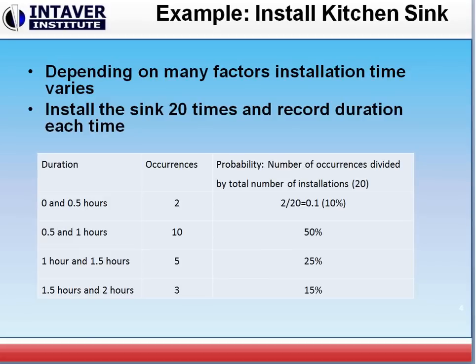Now in these 20 times, we saw that twice we were able to complete it in half an hour or less. Ten times we completed it between half an hour and an hour. Five times between an hour and one and a half hours. And finally when more things went wrong, we forgot where our tools were, we didn't have the parts, it took us between an hour and a half and two hours. This lets us build up some probability that we can complete this activity in a certain amount of time.